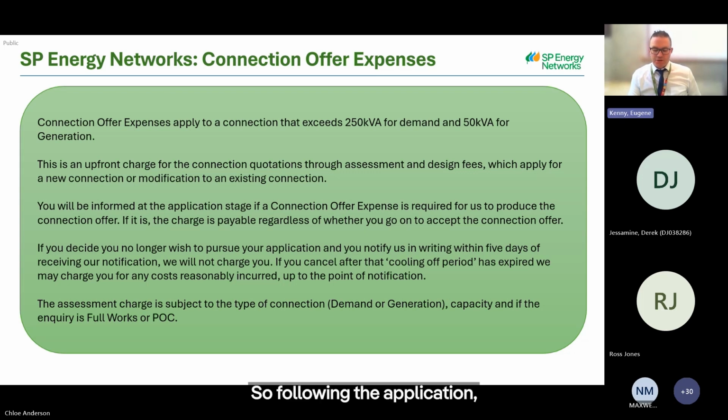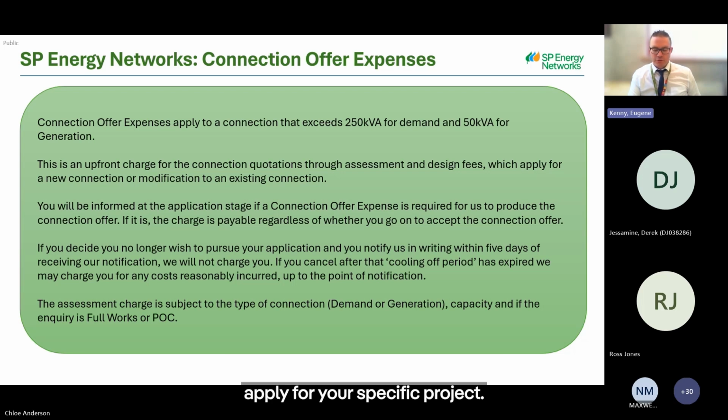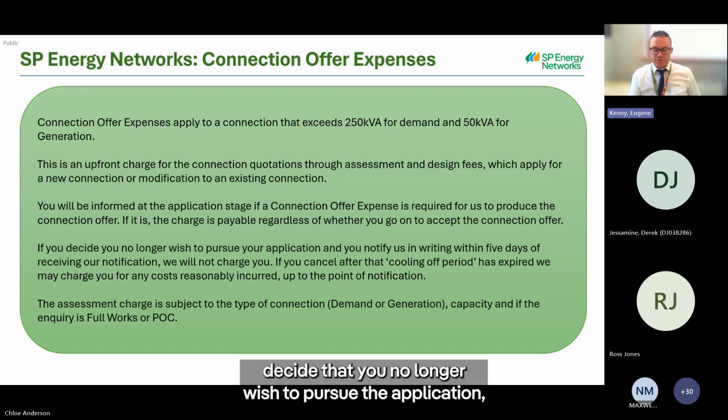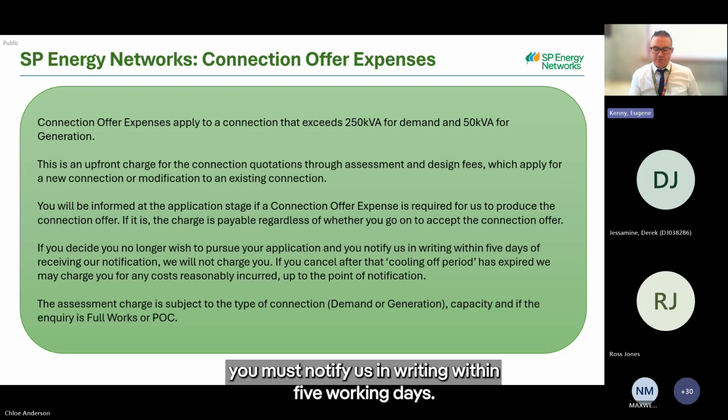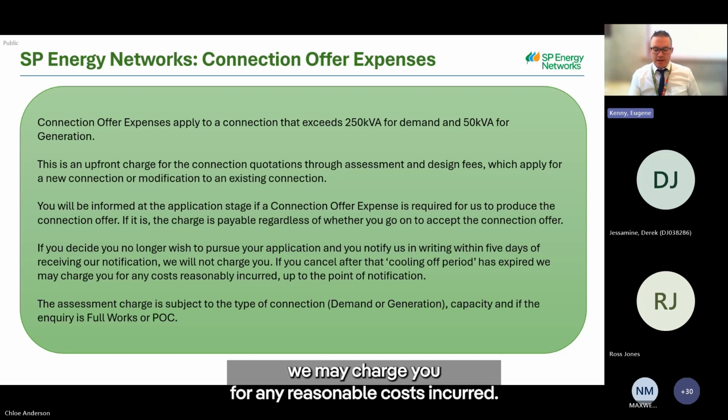Following the application, the designer will contact you to discuss your requirements and notify you of what assessment fees may apply for your specific project. If you decide that you no longer wish to pursue the application, you must notify us in writing within 5 working days of receiving our notification. If you notify us after the cooling off period has expired, we may charge you for any reasonable costs incurred.